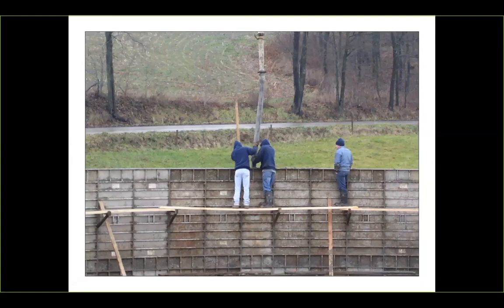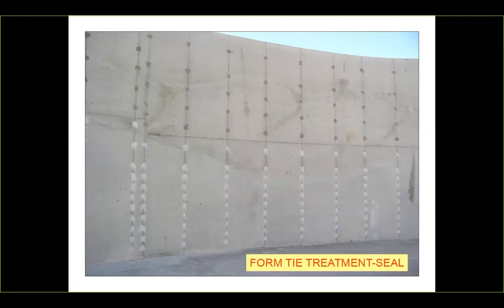If you're doing quality control, you need to make sure that they're not letting that concrete fall more than 5 feet by ACI standards, nor are they moving too far along before they start vibrating it. And also making sure that they're not placing the concrete in over a 4-foot or 5-foot lift, and that will be important when we get to the next slide.